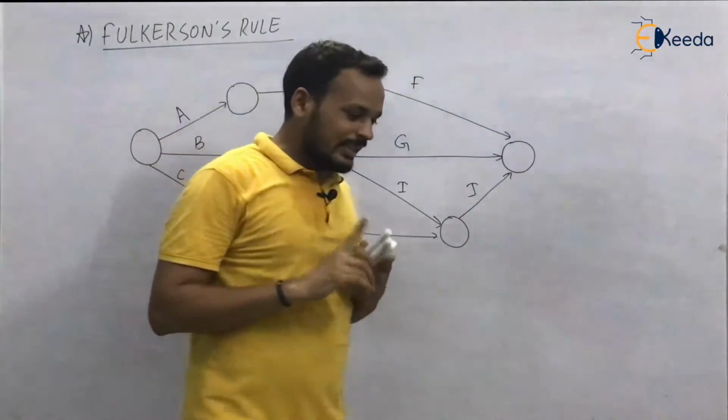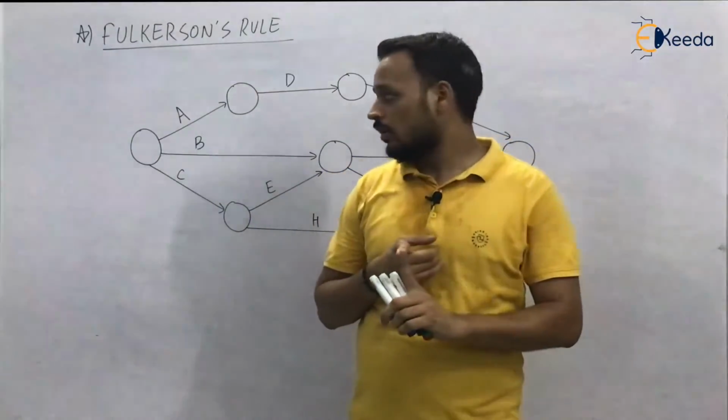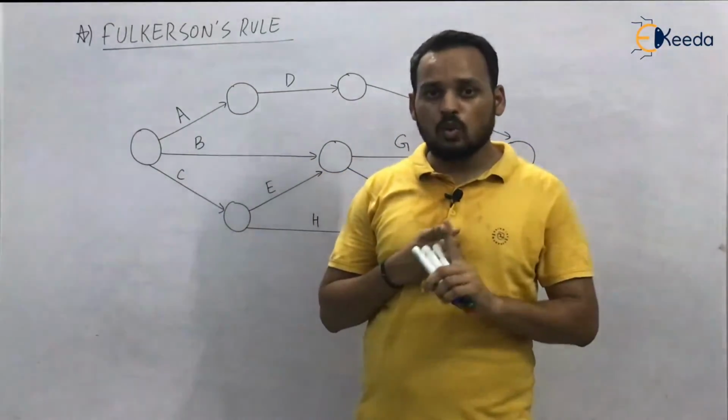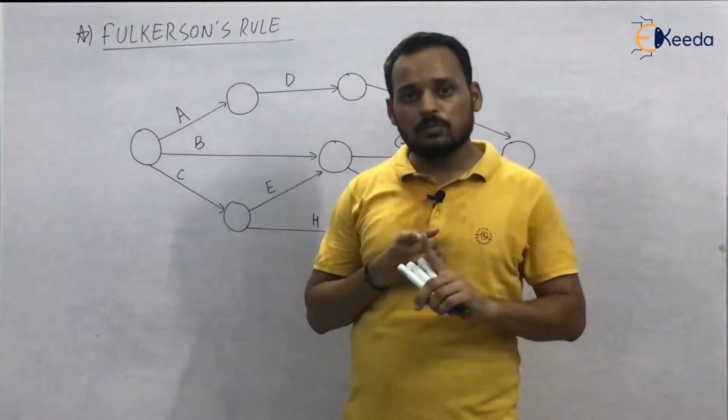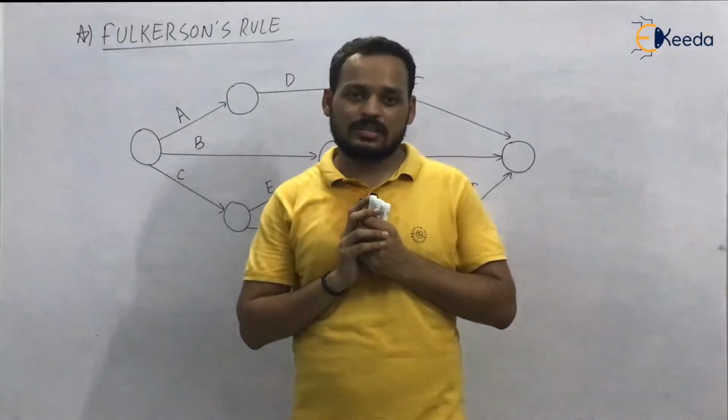So what it says is that first name those nodes which do not have any incoming activities.